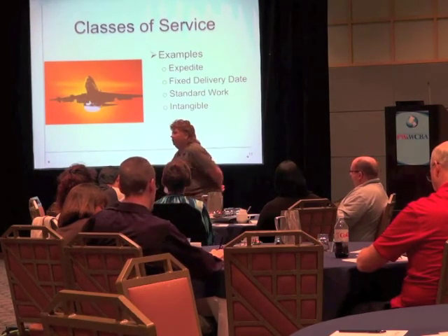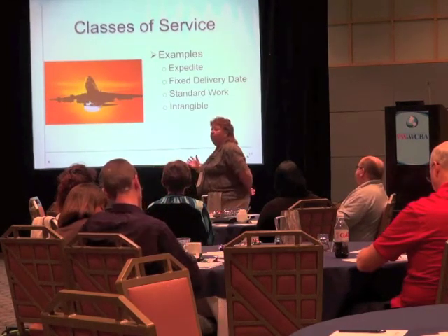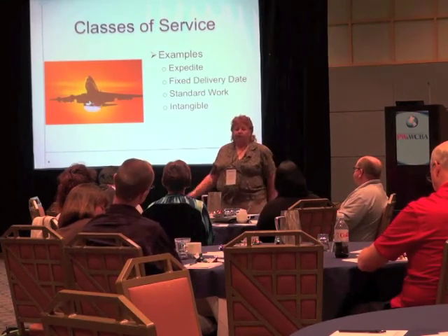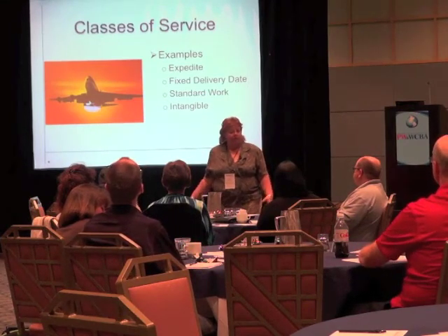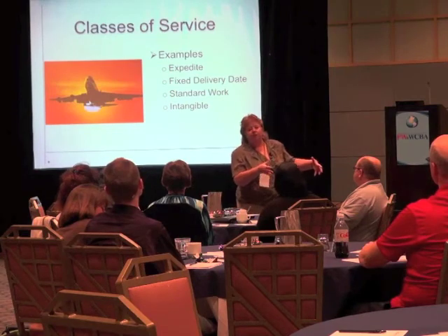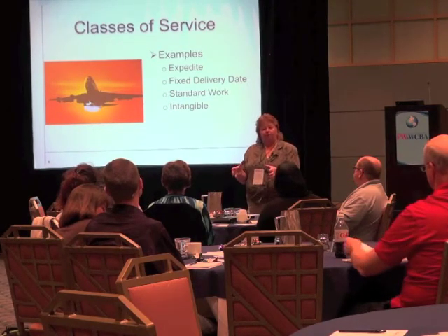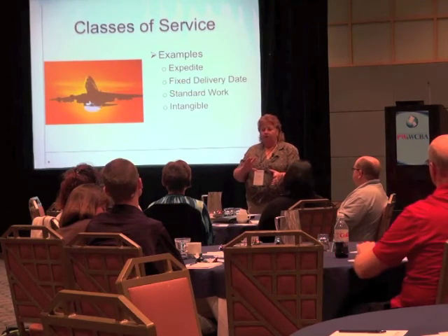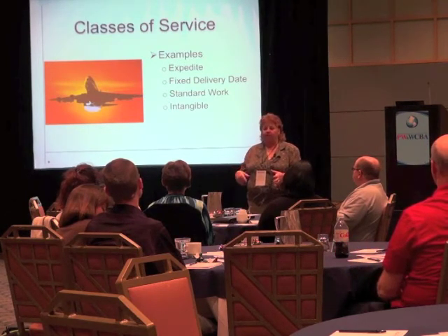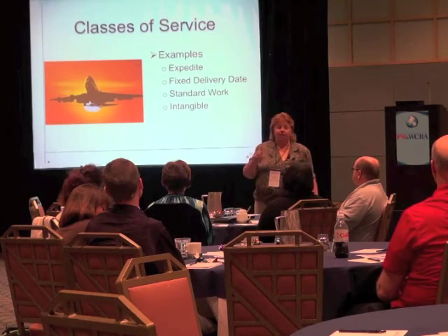And the nice thing about it is that not all classes of service have to have equal weighting, right? You might decide in your organization, maintenance needs 70% of the love we have to offer. Leaves us 30% to do any new development stuff. So clearly, you're gaining new development there. And you can flip that paradigm on its end.